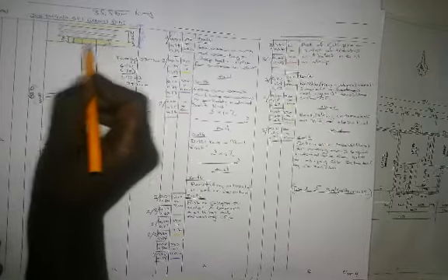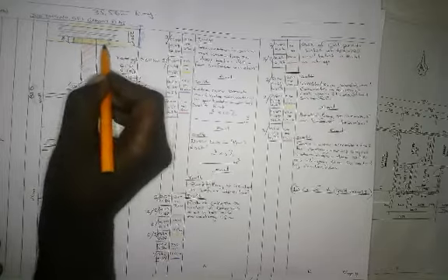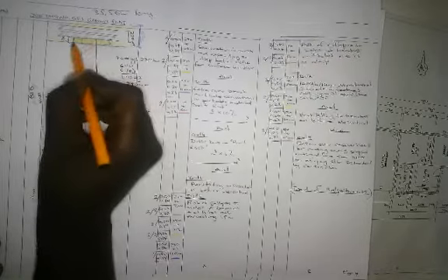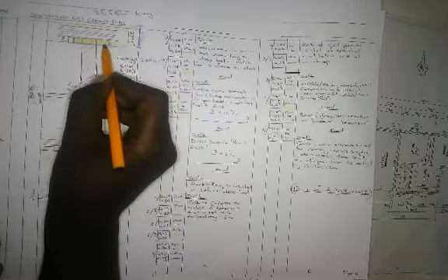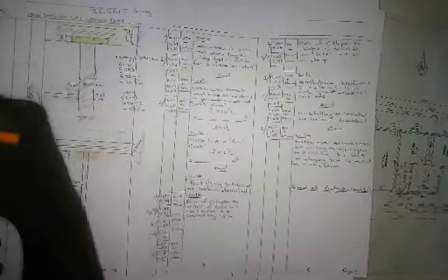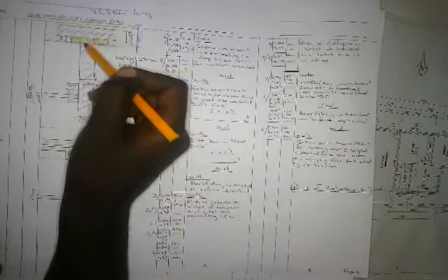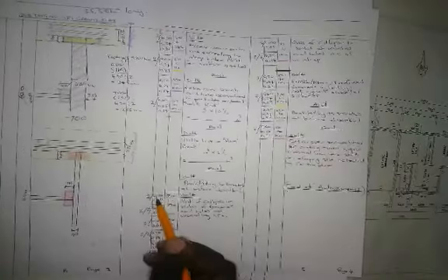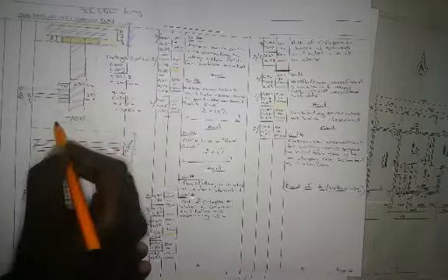Now the risk of collapse is a pretty simple understanding. Remember, risk of collapse is just in meters. If you look at the 230 versus 270 wall, you won't do risk of collapse in this part that we have deducted, because it's already been measured. You can't measure it again.